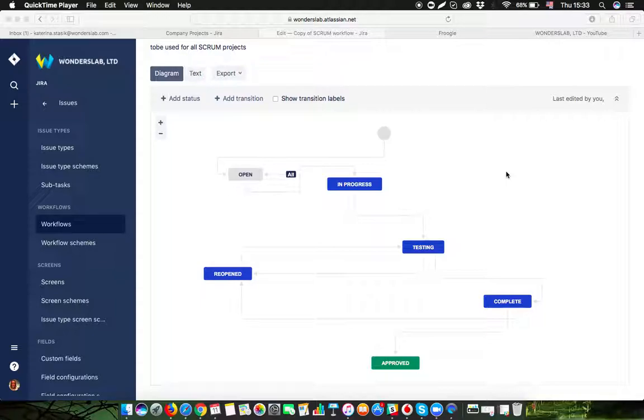While working on stories and subtasks, designers and developers get tired and grow biased toward their own work, and you need a set of fresh eyes and fresh brains to check what has been delivered and whether it is what we intended to deliver. That's why I recommend having user acceptance testing. Ideally, I also recommend having a test during development, but not everybody can afford that because it's kind of expensive.